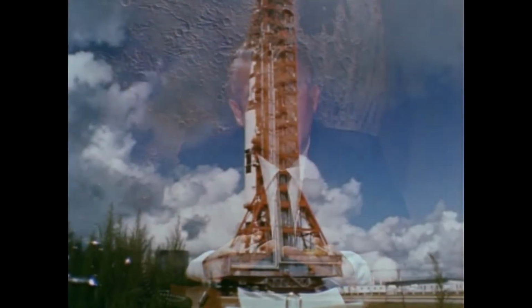We have learned the hard way that most rocket failures in the past were caused by deficiencies in equipment, in components of the flight hardware that existed there even before the rocket was launched, but the launch crew wasn't aware of it. It didn't have the visibility to know that there was a sticky relay or maybe a blown fuse in the rocket. And so we have provided an automatic checkout system where the entire rocket is checked out with the help of a computer in something like 2,000 distinct points where we would like to diagnose the health of the rocket before it takes off.